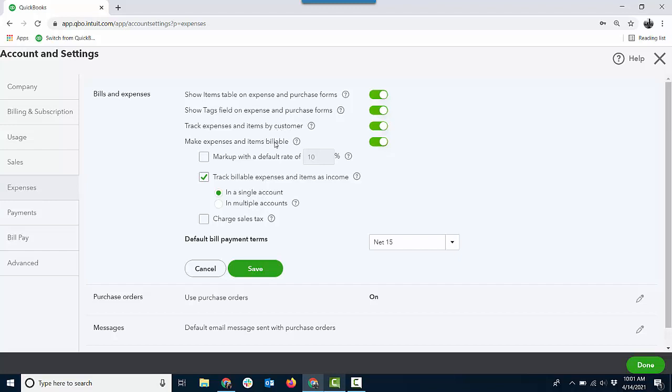If you're not passing anything through, you don't need to mark it billable, but sometimes it's nice to have the checkbox there. However, if this is just creating estimates and you're progressively invoicing against them to close the job and you're not actually passing anything through, then you can toggle that off. I actually use the billable box as a workaround for change orders. Right? So anything extra that I put on an expense form or time or whatever, I mark billable to pass through to the final invoice, if you will. It's quote unquote a kind of workaround to a change order because we don't really have change orders in QBO land, right? Just an idea. At least you want this first one on.